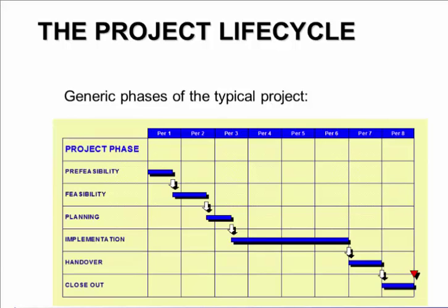So it becomes commissioned, and then it has a handover phase and then a closeout phase. So the handover phase could include further testing to prove that the tasks and the requirements have actually been met, and that closeout will then put the tasks in a fashion that can be used by the client.